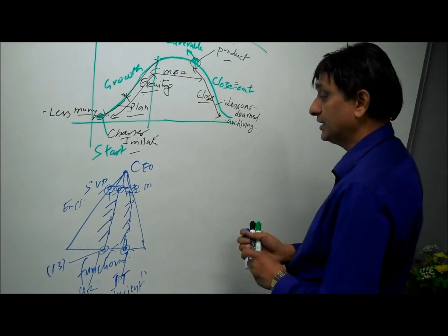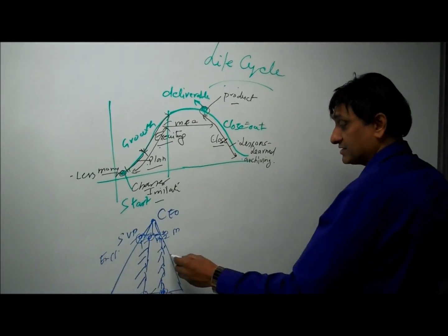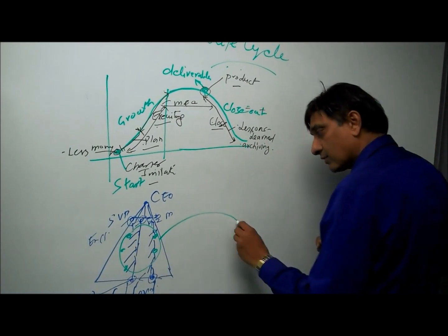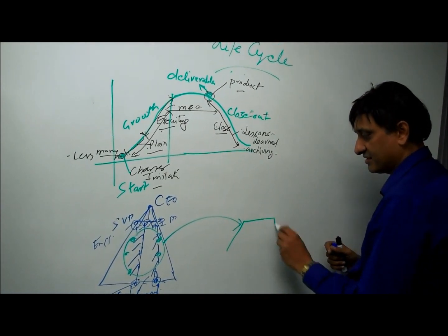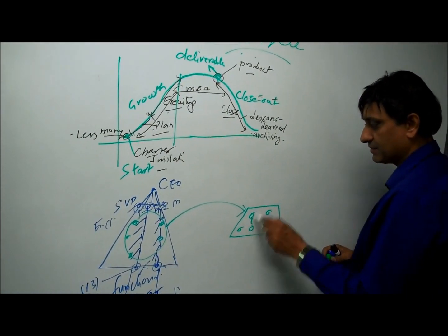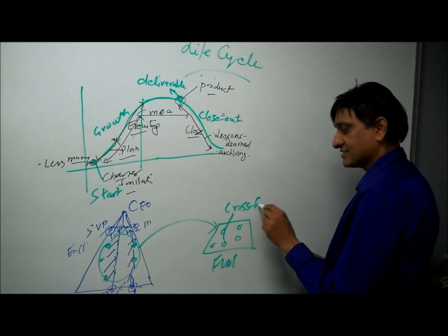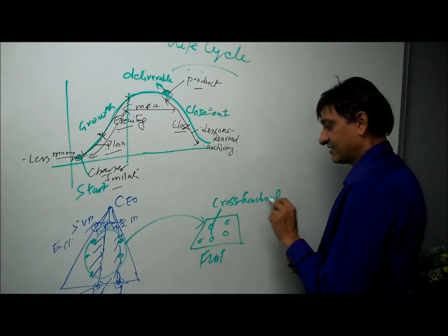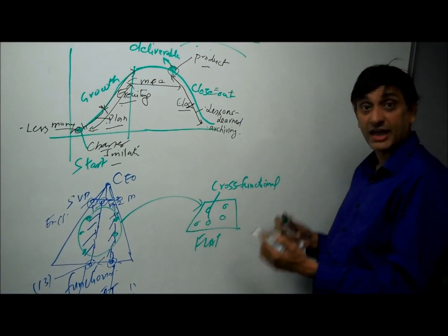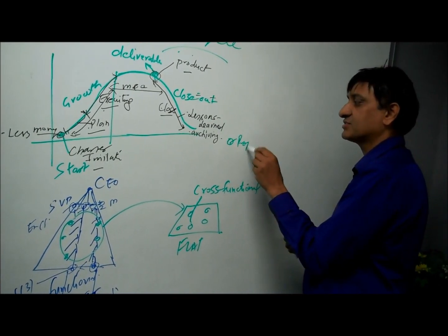The solution is that if you want to do projects faster and manage the life cycle efficiently, what you need to do is take the key people from different places and create a cross-functional team here. Of course, it will be flat, not that bureaucratic, because all these cross-functional members come together in this flat structure and help you implement the project faster. Right? And if this is a flat structure and the project manager has more control, and sometimes complete control, then we call it a projectized structure.